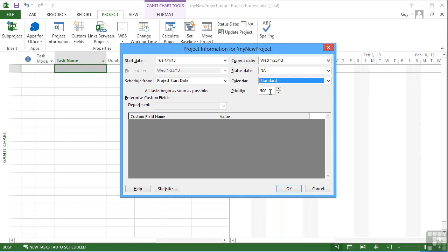So your tasks can be prioritized to any degree between 1 and 1,000, which seems like a wide scale. But the idea is that you could set 500 for some, 600 for another, 700 for another, and you can then move tasks priority to be between other tasks by coming down to, say, 550. So that's halfway between 500 and 600. Whereas if you just had a 1 to 10 option, it would be very difficult to then drop tasks between in a priority list.